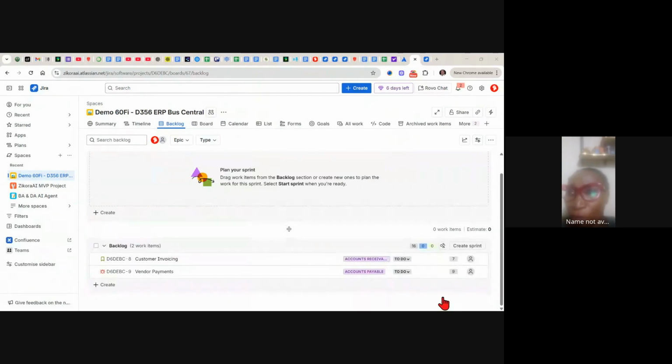What you taught us, there's a standard syntax: as a user, by that we mean as a XYZ, you state the particular kind of user, the user persona. Then I want to do something, an action that the person wants to perform. And then the last part of that user story syntax is the result that should come from what the user has done.